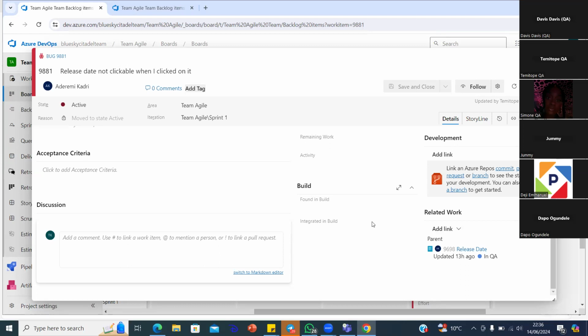You can even put a comment on the discussion, right? And put your screenshot there, as evidence that shows you've tested it and it's working fine, right? You close this one after you put the comment in there and also the screenshot, because you want to establish that you've done it. So you click and save, right? Then close that, and then you go and move the bug.